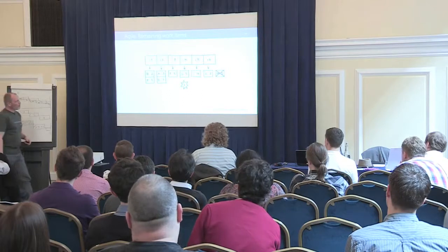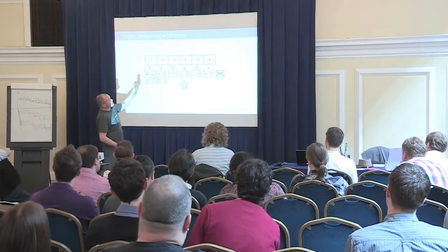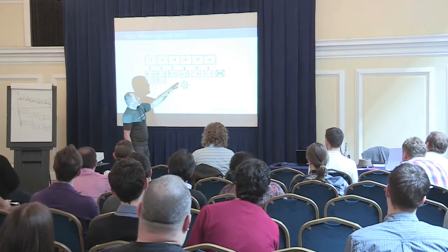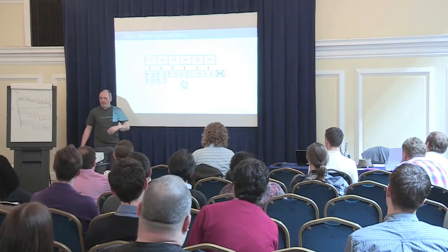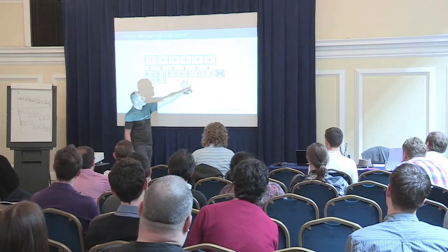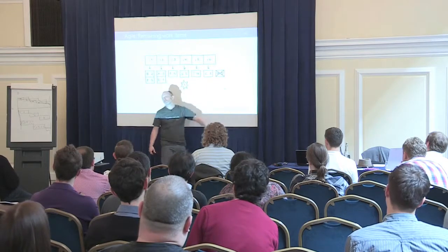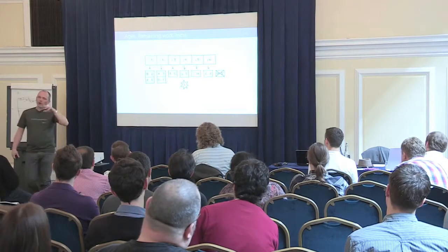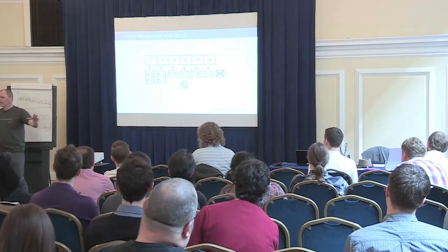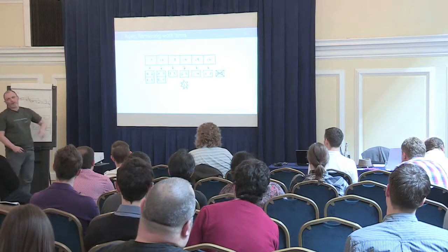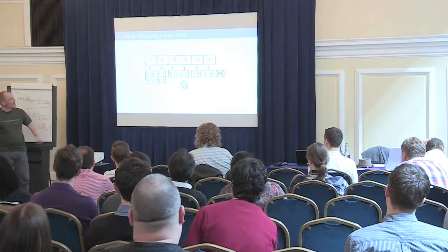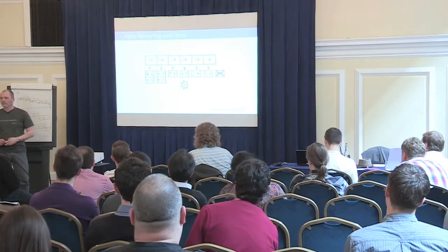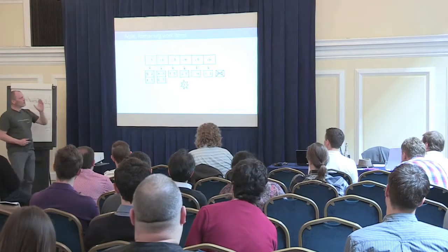First of all, you might say that if I have 6 iterations in my project, and I move along the project and I add new stuff to the backlog, that probably means that at the end of the project, I will have work items left to do. But since we prioritize over and over again every iteration, there's one thing you know about these work items at the end of the project. They are, by definition, the least important work items in the project. And I've seen it numerous times.